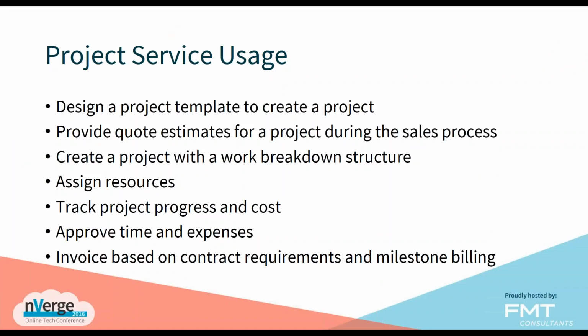First, we begin with designing a project template. This gives us a cookie-cutter model on the ability to create certain tasks and timelines with contract milestones that we can apply to multiple projects. So as we acquire new contracts, new customers who would like to have the CRM implementation, we're able to use that same template over and over again and modify that template as needed. But it really gives us a leg up to get started.